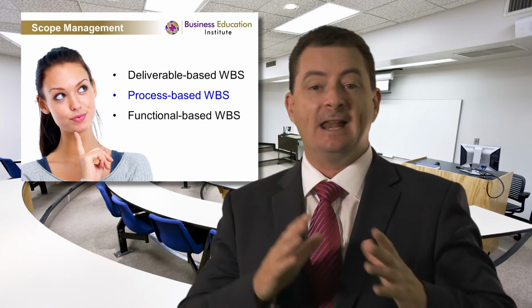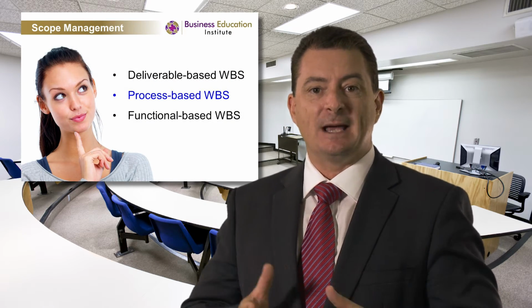The second type is known as process-based. And again, these activity structures are based on how we best think. So in terms of a research project, it might be better as a process-based work breakdown structure because the activities might be better stated as design it, build it, test it, commission it, for example, and it is much better for us to understand it in terms of a process.